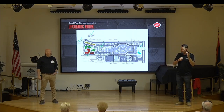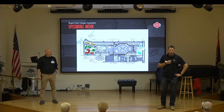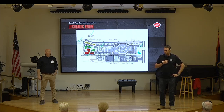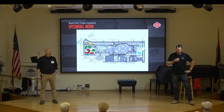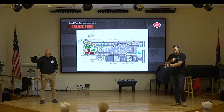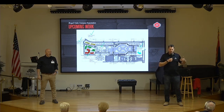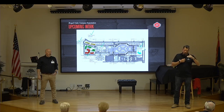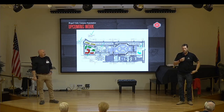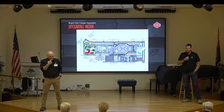I'm not going to lie to you. We had a really big challenge trying to get through the county. I went back and updated the schedule, and we started our inspection process on the 9th of October in building D. With all of the requests, we found this, we found that, it took us that many days to get the C of O for that building. So why did I tell you all that? Because we had to pull Lisa off of those things to come help us get this building done. As things move forward, we are seeing work orders, and she's getting back into the regime of tracking those and getting things clicked off. We had a few that we've taken care of in building B recently, so we're working on them.